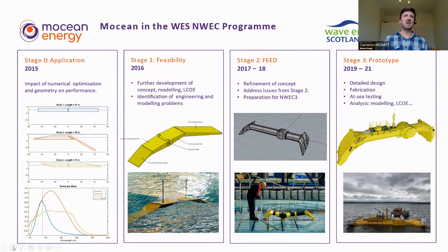We started to identify challenges within the numerical modeling and things that we didn't understand. Fortunately, we were able to make it through to the stage 2 program, which I would call an 18-month FEED study. We further refined the concept, addressed the problems that we identified from the engineering and from the numerical modeling, and prepared ourselves for the stage 3 project.